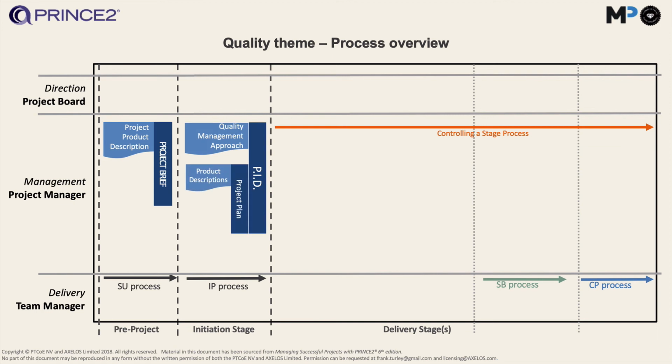Then when we break down the products, like we create a work breakdown structure, or PRINCE2 calls it a product breakdown structure, which is actually a better name. We have a post-it, like something for each product we're going to create, each deliverable. And then we create a product description, a list of requirements. These are our requirements documents. And in there, we put the quality information.